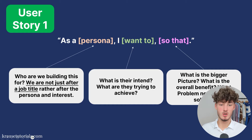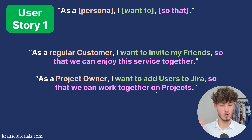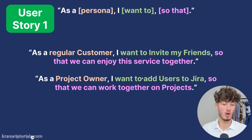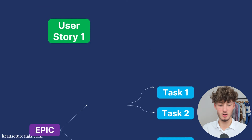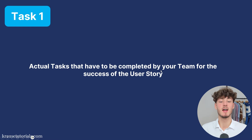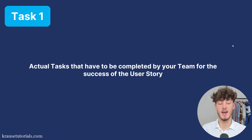The third variable is 'so that' — what is the bigger picture, the overall benefit, and what problem should be solved. These statements should be implementation-free, so do not describe any part of the UI, and do not mention any technology. The only thing you want to cover is the actual user goal. Some examples: 'As a regular customer, I want to invite my friends so that we can enjoy the service together.' Or: 'As a project owner, I want to add users to Jira so that we can work together on projects.'